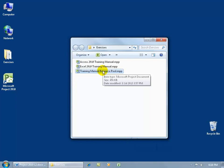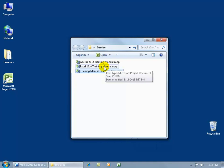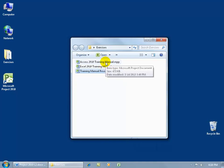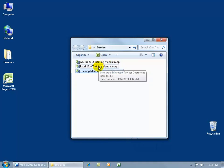If you assign a resource in one project and assign the same resource in another project at the same time, it will flag you and say that this resource is over-allocated. For example, if their standard working day is eight hours and you've already got them for eight hours in another project.